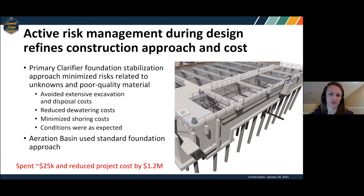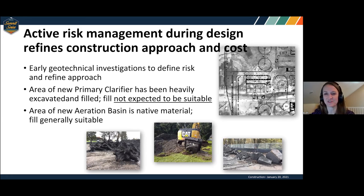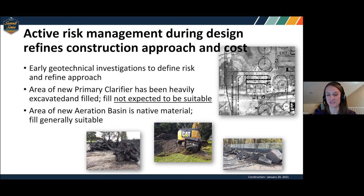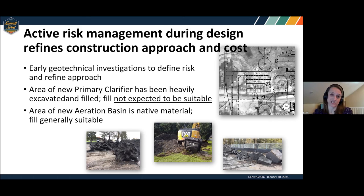So what we did was spend $25,000 to do some potholing and selective pre-excavation to see what was there. From those photos, the area by the primary clarifier did indeed have some stuff in it — stuff we didn't really want to deal with, certainly not during construction. That fill was not suitable for any kind of foundational support. But the aeration basin was actually just native material, and so it was going to be fine for support of that new structure.